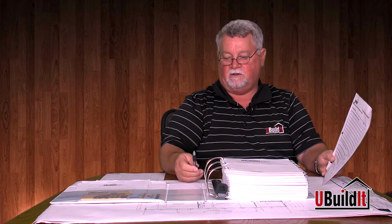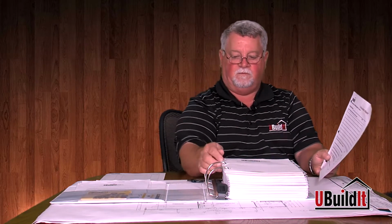As soon as we show up at the job site, we hop out, we start taking photographs of what's been done, and that's what we write in our report. You know, building pad complete, forms are set, footings dug, ground plumbing installed. If we check the ground plumbing with the client, we put that in our report: client and I check the ground plumbing together. If there's any issues, I put in there how I advise the client to handle the issue.